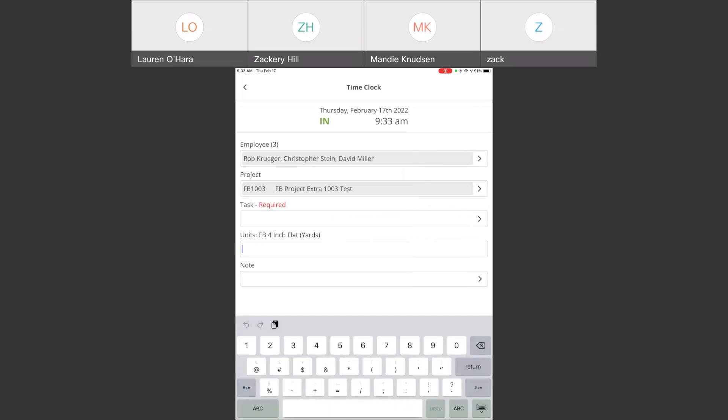And because I have designated that specific task as a task that requires the entry of a production unit, when I come back into the system to either clock out for the end of the day or clock into a new task, you can see that it applied a field asking me to provide how many production units were accomplished for four-inch flat work, and it's asking for it in yards. So, I can put how many yards, essentially, of four-inch concrete we put in there.